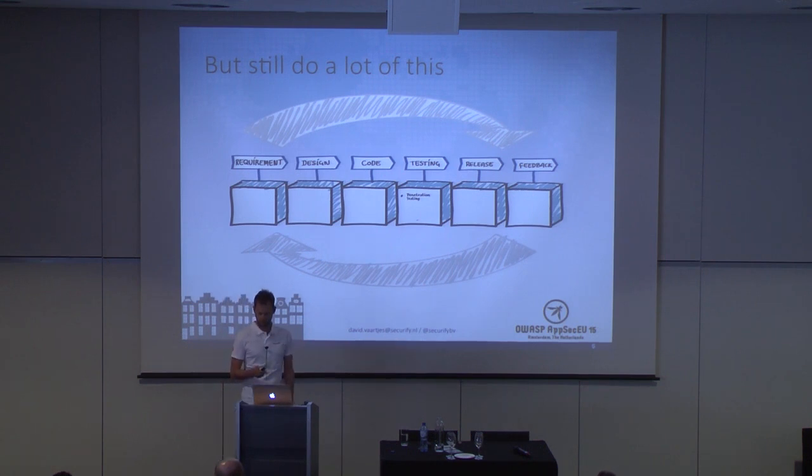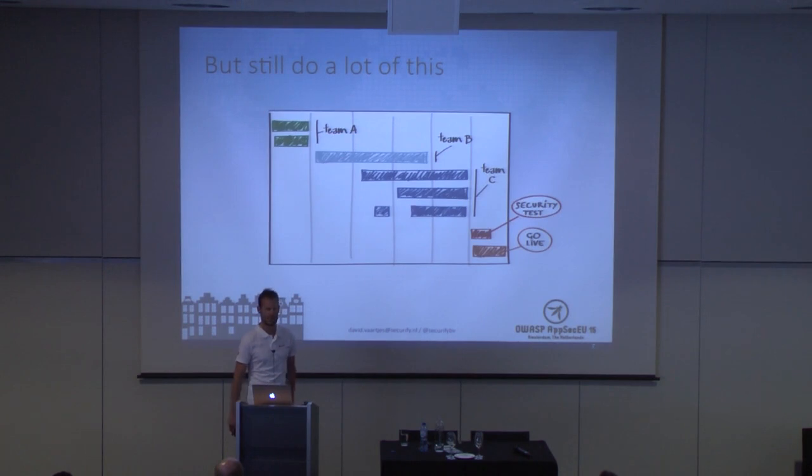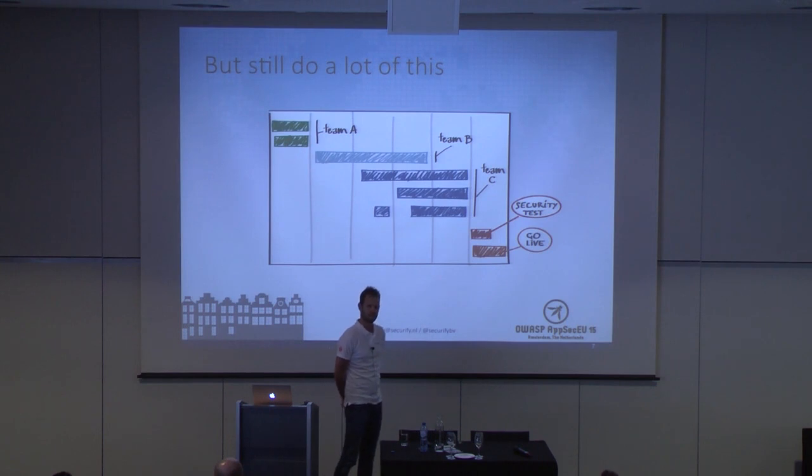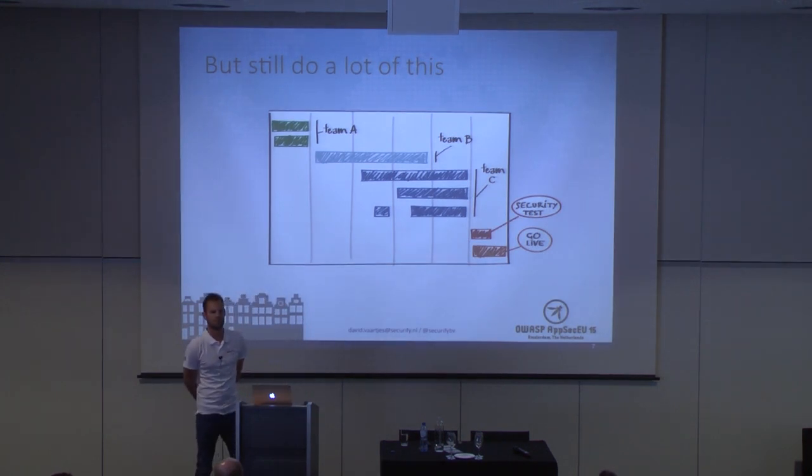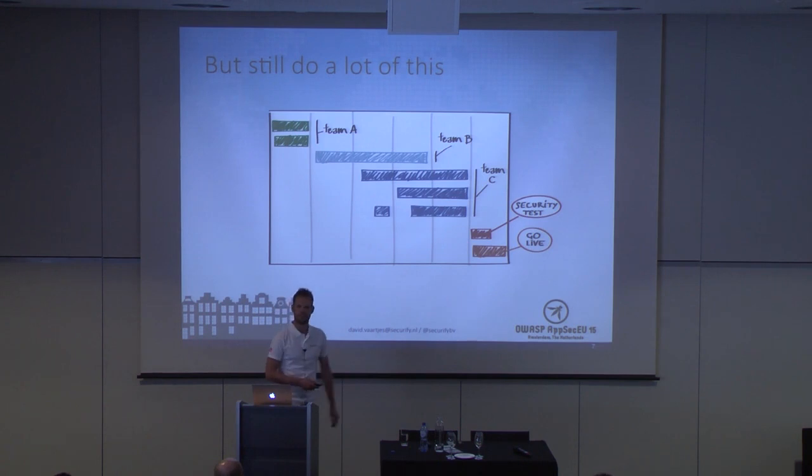So when you look at this from a project timeline view, this is what you get. You start designing and building your software, and somewhere you plan for a 2-3 week pen test ceremony happening right before you go live. And chances are high that if you didn't do anything about software security in the early stages, the thing you are actually doing is testing if it got secure by accident. And this will ruin your planning because there will be findings and you won't go live. So probably you all know about this, right?